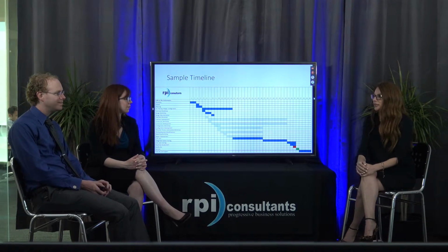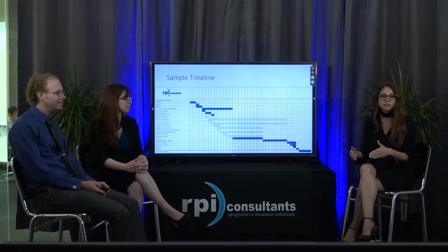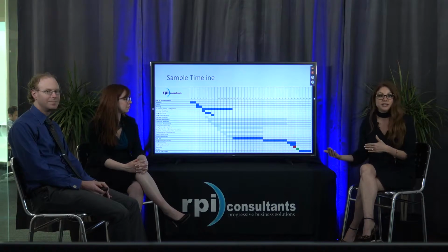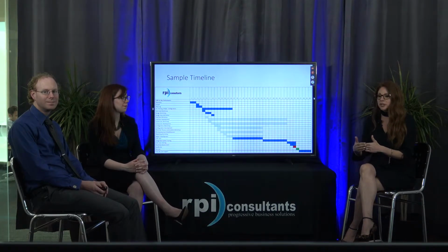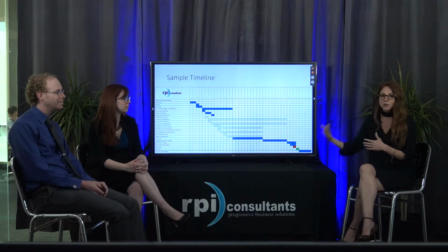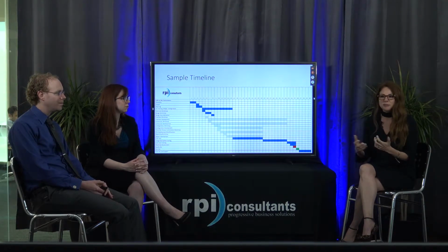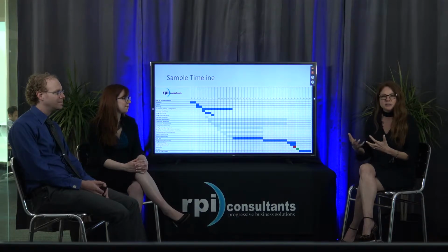And I think one of the things you like to say is just capitalize on that momentum. So if you've gone live with global HR, don't wait a year to start doing phase 2. Put in 4 to 6 weeks of stabilization time, and then get going again. Give some break time to your staff, but keep them in that same mindset, and maybe little milestone celebrations and things to keep people engaged.